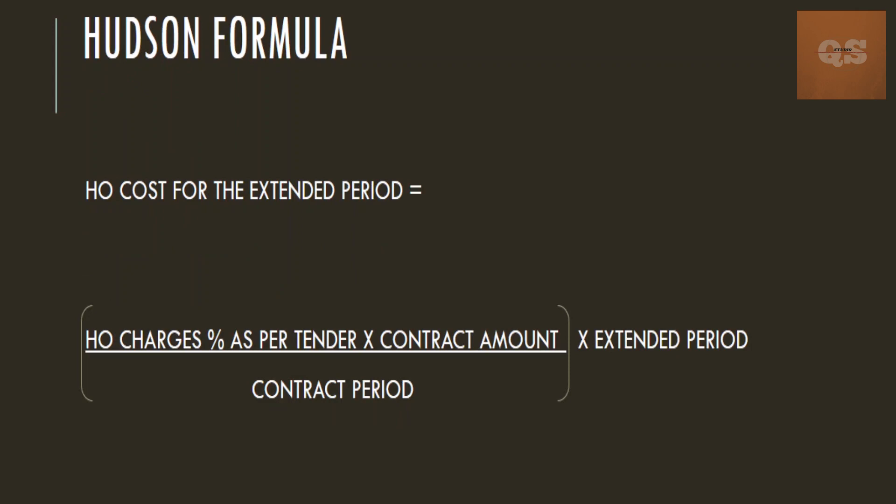Hudson formula. This formula can be used once a percentage has been specified in your tender document and has been mentioned in your contract. Using that percentage, you can calculate your head office charges. This will be the percentage that you will be using while costing your entire project, and the same percentage can be used to calculate your head office charges for your extended period of time. Once the client or the engineer has extended your time and agreed that the percentage mentioned in the tender document should be used for calculating the head office cost of the extended period, then you can use this formula.